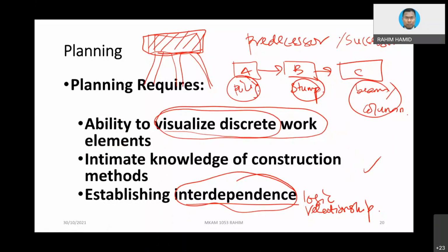Okay, let's say activity, activity predecessor. Activity A, B, C. So what is the predecessor of activity A? It's basically none, because before activity A, there is nothing, in this diagram, just an example. What is predecessor of activity B? It is activity A. So you write A, and then the predecessor of activity C is B.